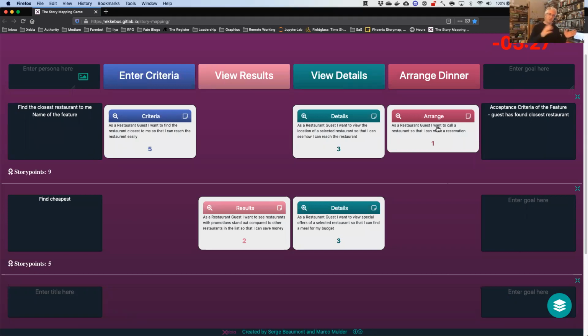Like I already said with the previous answer, this was indeed the case where all the stories were there and you had to kind of go upwards. You can also imagine the story mapping going from a high level to a low level. You have a big epic saying, this is the process we want to implement, and after a first refinement you have some names, like version 0.1, 0.2, 0.3, 0.4 of that process, and then start refining it further down.